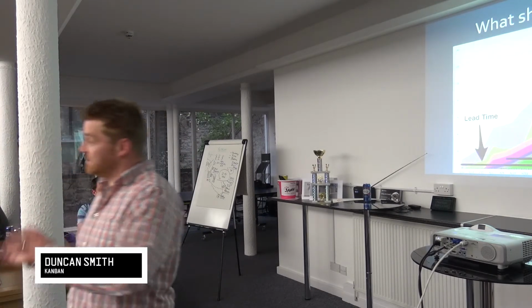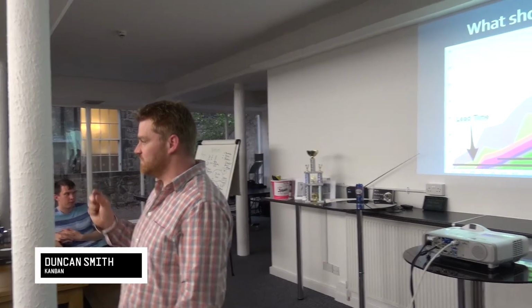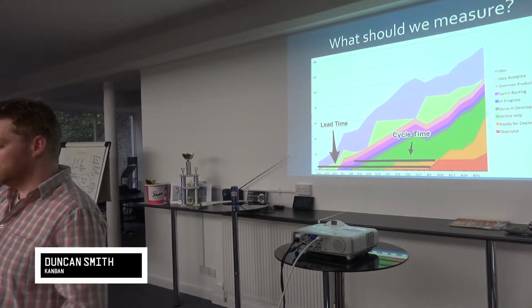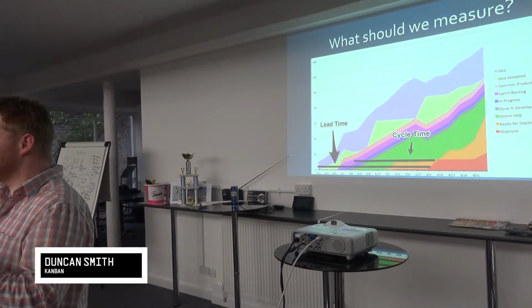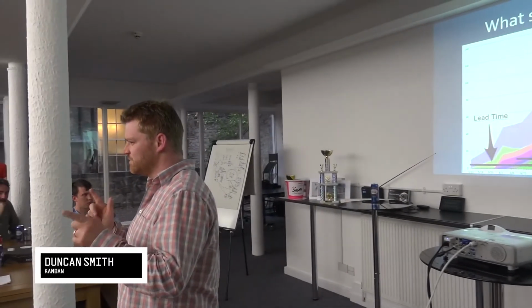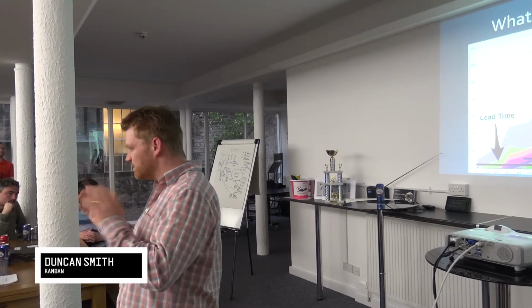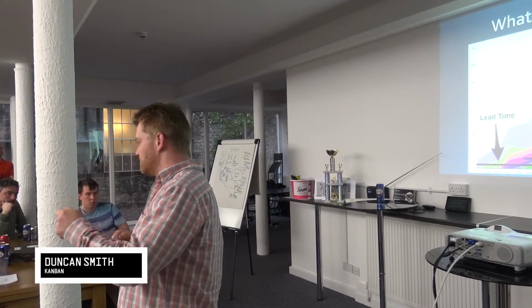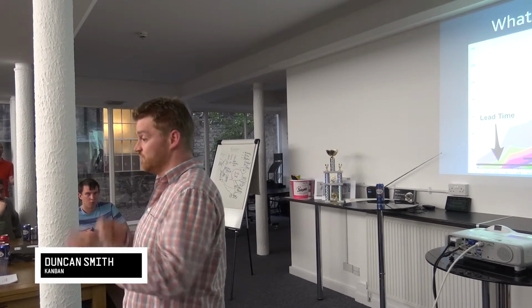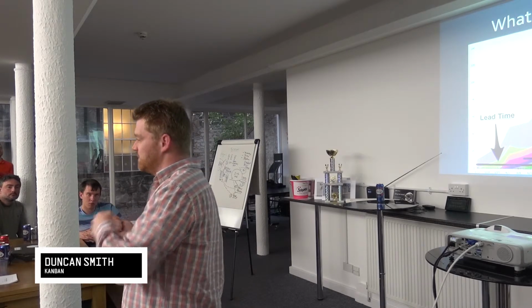So how do you translate that to some of your graphs? It looks a bit complicated in here, but actually once you understand it, it's fairly straightforward. So cycle time, you can actually measure between any 2 points. Typically it's measured between when you start things and when you've delivered them. But if you are interested in the amount of time it takes to get between your developers and your testers, because there's something going on there that they have to be checked, or you have to get hold of maybe a test rig. Something I've seen before is it goes into test, it sits there for ages, and then it jumps back out the other side.